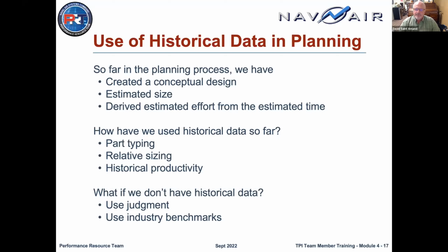original estimate. That was by monitoring it on a weekly basis and going back on a monthly basis and replanning the work. So basically collecting the historical data as they went along and working it back into the plan. So obviously the first month's historical data wasn't all that great, but it did get better as the project went on and they understood the work a little bit more.